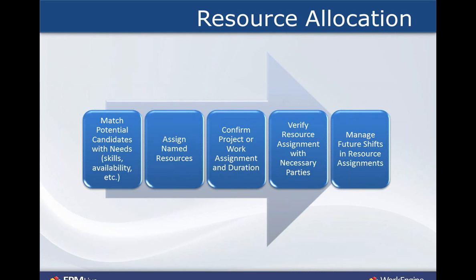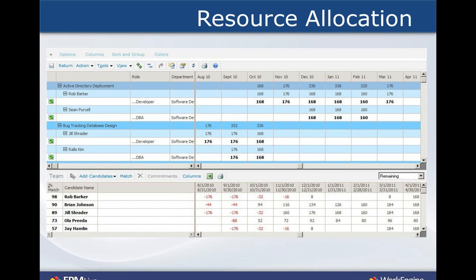So in this case, in a resource allocation mode, you would just do something similar to what we talked about in the generic resource capacity planning, but really identify specific candidates who can actually perform those roles on these projects. Also, always having an eye, as you can see in the lower half of this picture, whether or not there's any remaining availability or if there's an existing over-allocation of that resource to see if there's bandwidth within individual resources to actually fulfill that role on yet another project or another initiative.